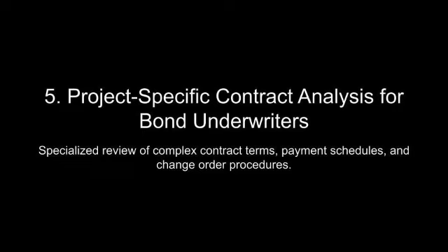Courts generally uphold these clauses only when they reflect a genuine pre-estimate of harm, rather than serving as a punitive measure. This distinction is rooted in the legal principle that damages in contract law should compensate for actual losses, not punish the breaching party. For example, a clause stipulating an excessively high daily penalty, disproportionate to the actual costs of delay, may be deemed unenforceable, particularly if the project owner cannot demonstrate a clear connection between the damages and the losses incurred. The enforceability of liquidated damages clauses also depends on the clarity and specificity of their language.